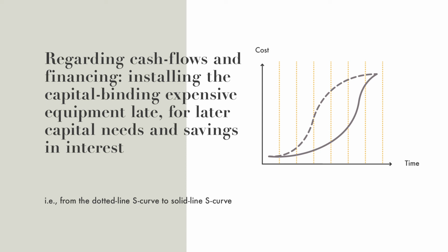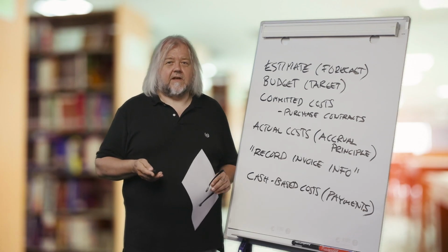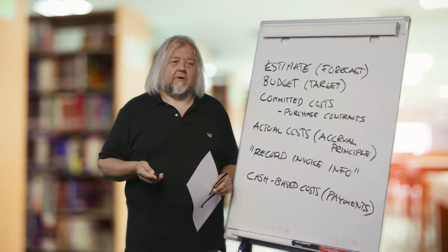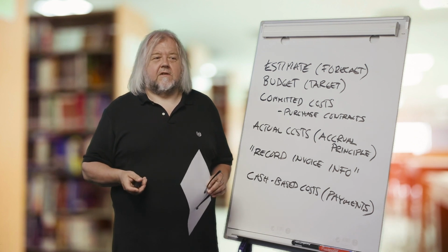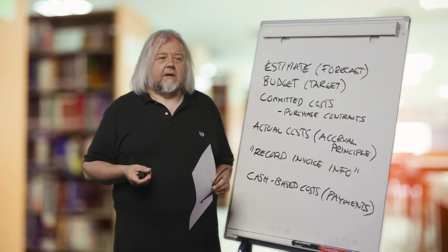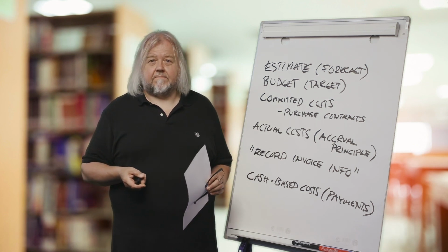So project management is not about just-in-time management, and this just-in-time thinking doesn't necessarily apply to projects, but rather, due to significant risks and uncertainties in any project, there must be time buffers and budget contingencies in place for coping with the upcoming risks and complexities.